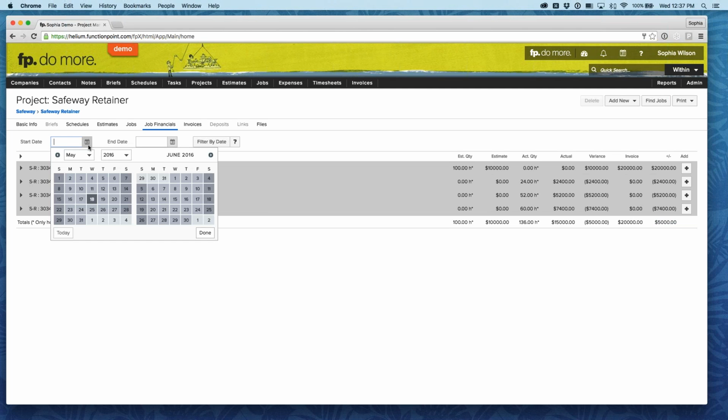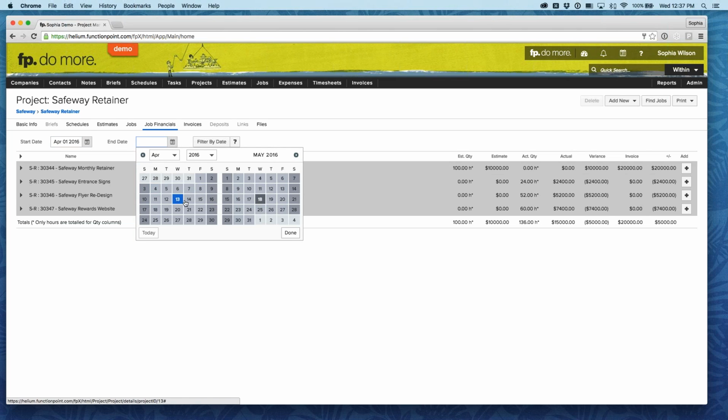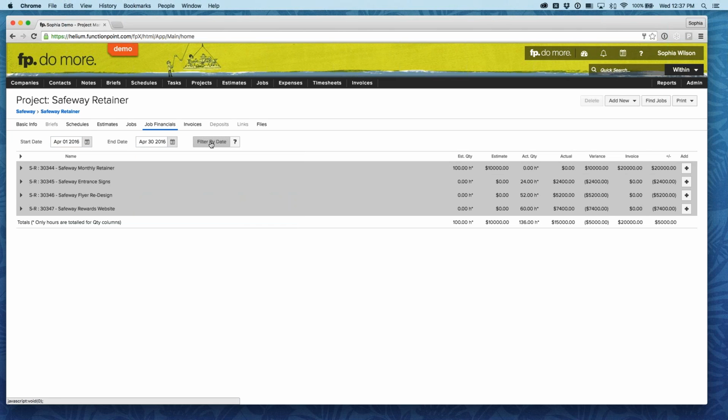So for this, we will take a look again at April. As you know, April was a good month. We had Easter and all that during that time. Filter by date, and you'll now be able to compare what actually happened within April. That did filter, right? Yeah, perfect. So you'll see that we spent 24 hours on the Safeway entrance sign, 52 hours on the flyer redesign and 36 hours on the rewards website, coming to a total of 112 hours. Comparing that to what we had expected of 100 hours, we did go over by 12 hours, so we had a loss of $2,000.